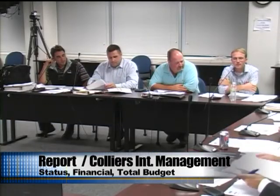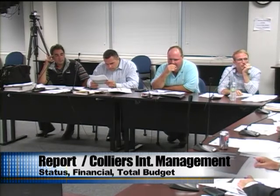Ben, you talked about soft costs that were below 10,000, some number? Yeah, we're running about $9,600 over what we allocated for certain line items. Of course, there are going to be items in the soft cost budget that we're never going to touch, that will eventually be moved over, but we can't do that yet. But looking strictly at overages in certain line items, we are about 9,600 over in soft costs.